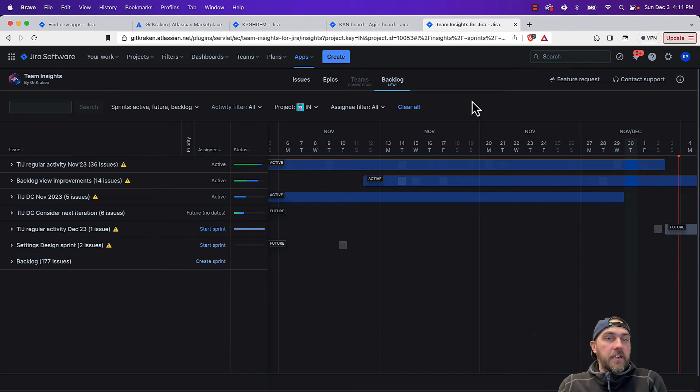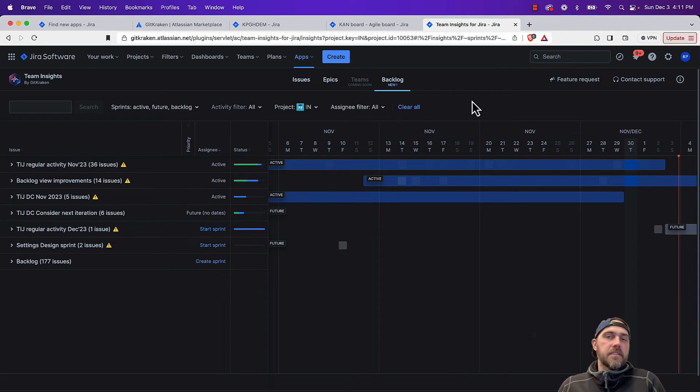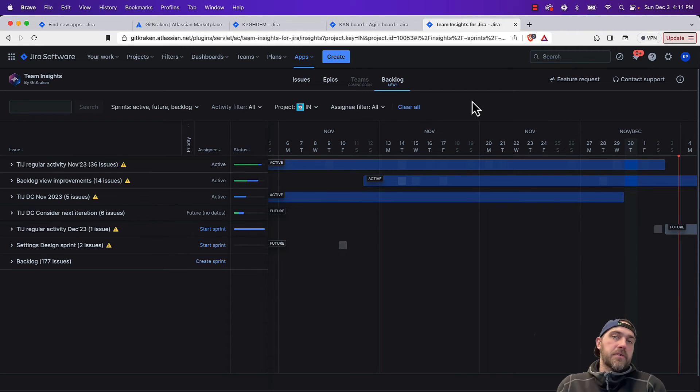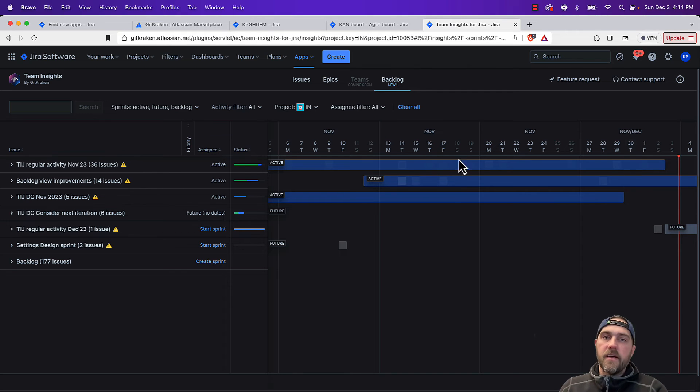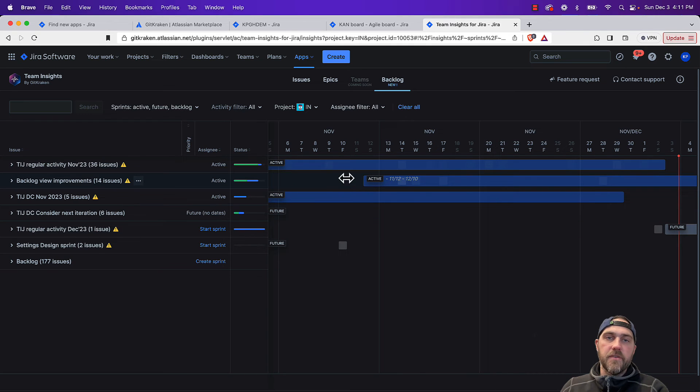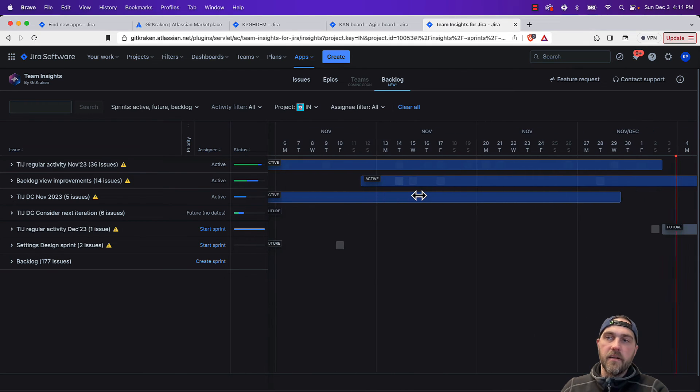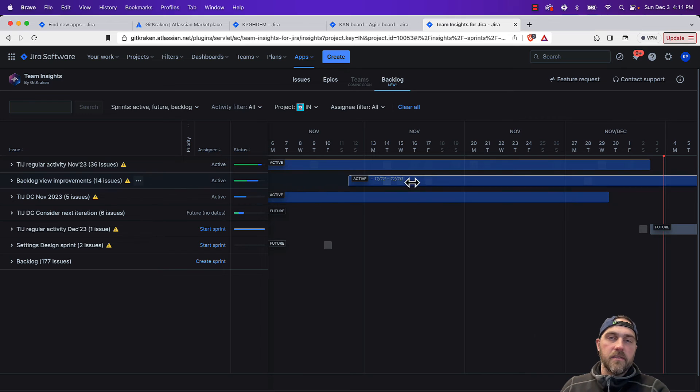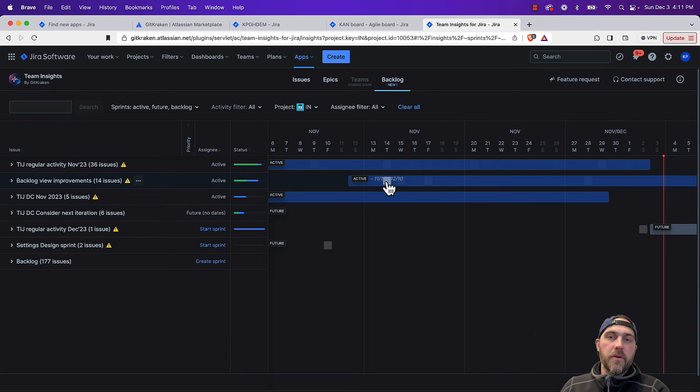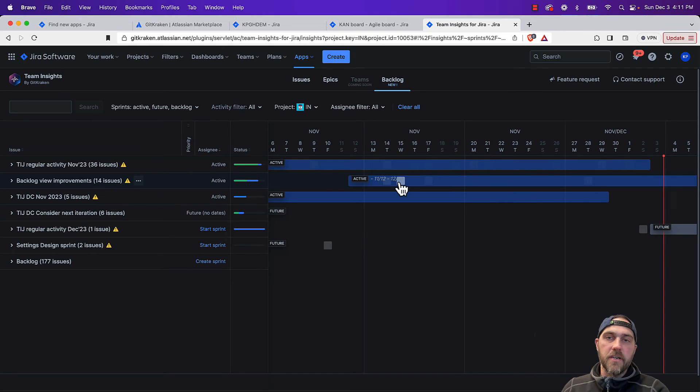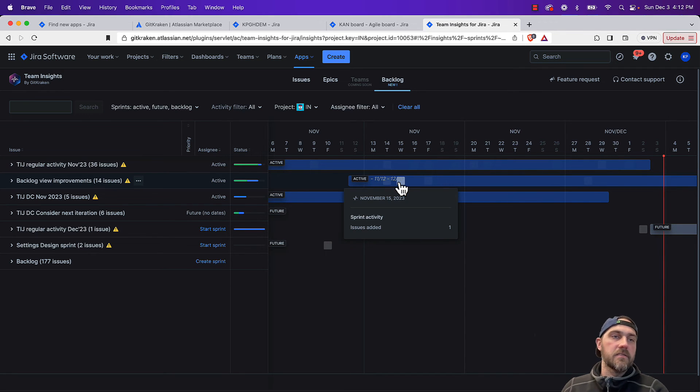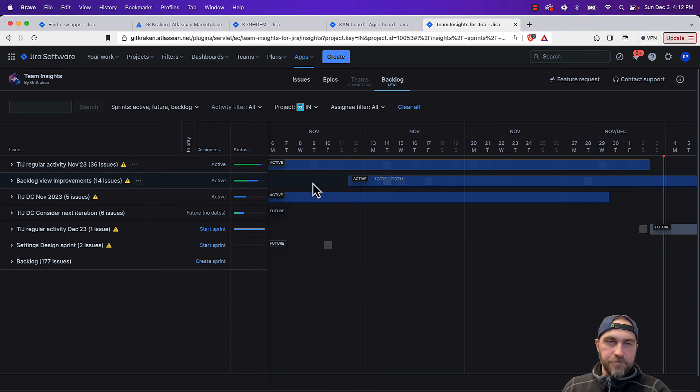So very quickly looking at team insights for Jira, as I mentioned, it gives you a multi-issue planning view. In this particular view, we're looking at the backlog view, which is going to organize your work by sprints. So in the timeline view here, you'll see these blue bars, which indicate how long the sprint runs for. So if you're running two-week sprints, you would see a two-week bar there. We can also see activity on the timeline. So all these boxes on the timeline indicate some activity. So in this particular case, we can see when issues were added or removed to the sprint.